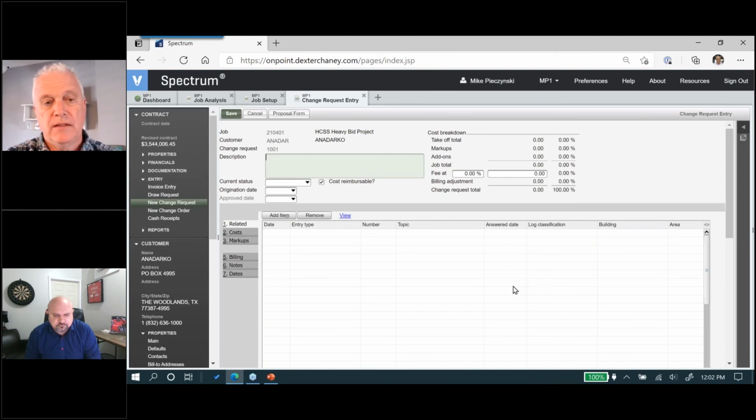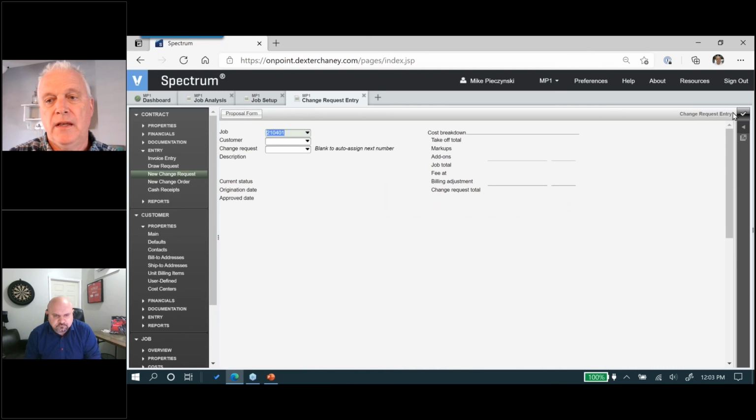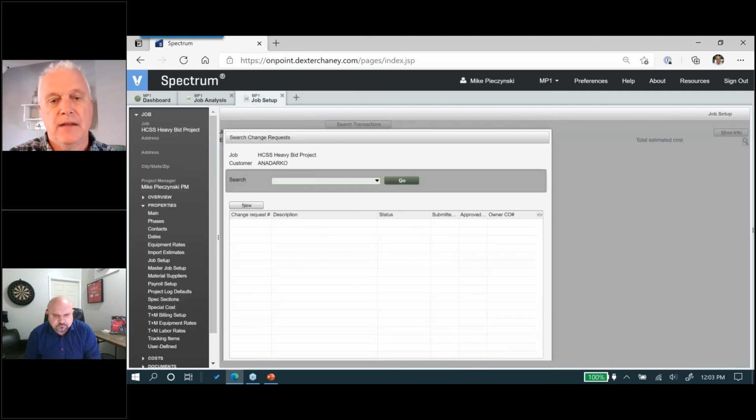And I'm just gonna make this up. I'll say extend length of north wall. Okay, that's our change. And the status is P, pending. I'm feeling good about that. So I'm gonna save it and exit that screen and go back then to the change import, asking me which change.